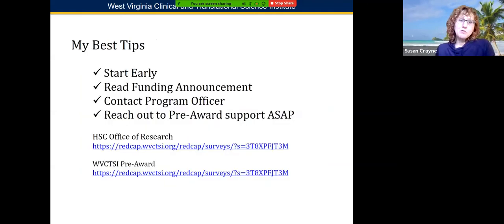So my best tips for doing a federal budget is to start as soon as you know about an opportunity. Begin with reading that funding announcement and make sure that your idea fits that purpose. A lot of details are included in the funding announcement. It includes not only the amounts for your budget and whether or not F&A or indirect costs are capped or included in the total or on top of the total. It gives you the funding period and also has specific budget inclusions or exclusions at times.